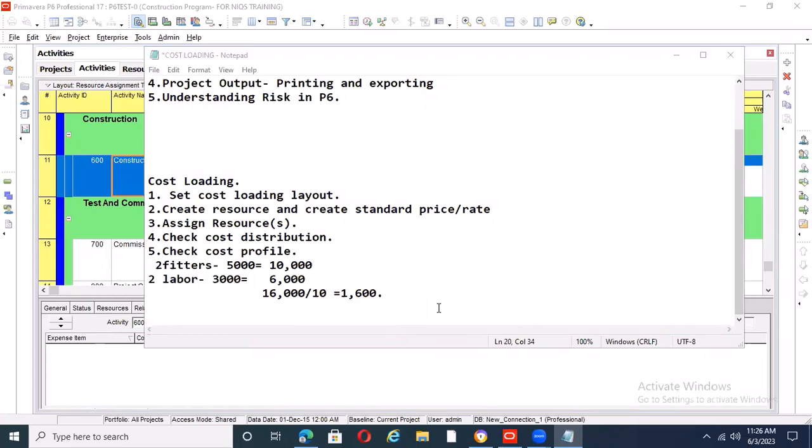So that's why I'm saying, if you're the one generating it, as an internally used schedule, you can use your P6 to prepare your BOQ. Create the descriptions as WBS, then do the breaking down into the activities. Outline all the activities underneath it. That's the safest way, so that you'll be able to assign costs to those things one after the other. Then you will not make errors. If you check which of the WBS is now more, you can trace your way back and be able to correct it.